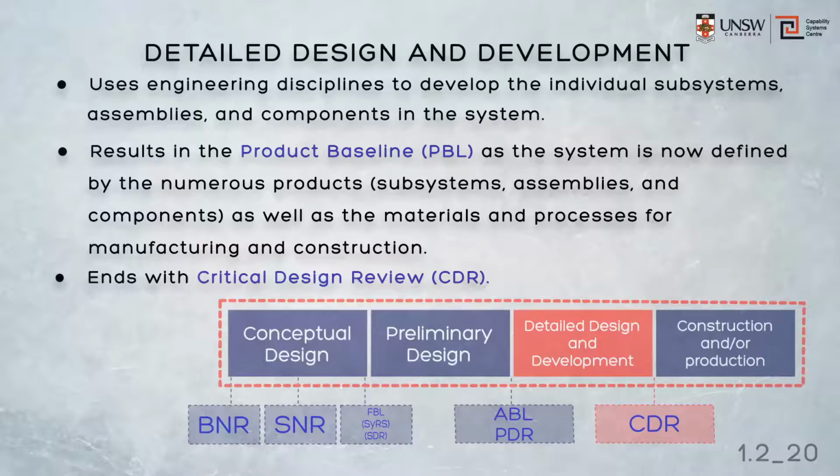The Critical Design Review is not critical by accident. It's the last time that the design is in paper. It's the final design review which results in the official acceptance of the design and the subsequent commencement of the construction and production. CDR evaluates the detailed design. It determines the readiness for production and construction. It ensures the design is compatible and includes a detailed understanding of all of the external and internal interfaces.